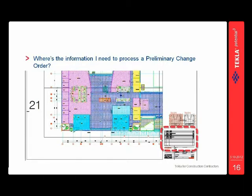If you want to find all the needed variables in order to give a fair response to, say, a preliminary change order with these drawings attached, then you'll need areas, heights, lengths, volumes, specification of the wall, old one, new one, that kind of thing. With 2D, pretty much you want to do a lot of reading, a lot of hunting around, a lot of asking questions back on the phone, get out your scale ruler and start making some assumptions.